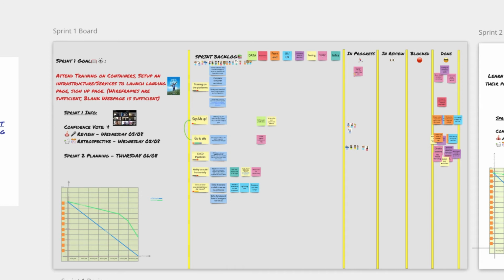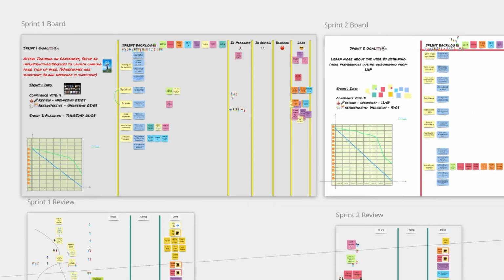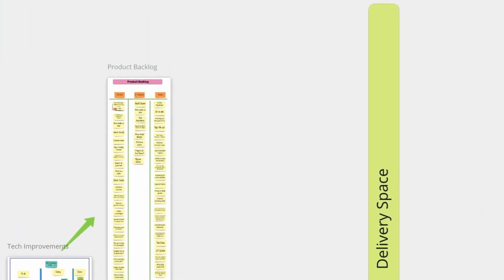The work to be performed in the sprint is planned at the sprint planning session and is created by the collaborative work of the entire team. It determines what can be delivered in the increment from the forthcoming sprint and how the work needed to deliver the increment will be achieved. The input to this meeting is the product backlog, the latest product increment, the projected capacity of the development team during the sprint, and the past performance of the team.